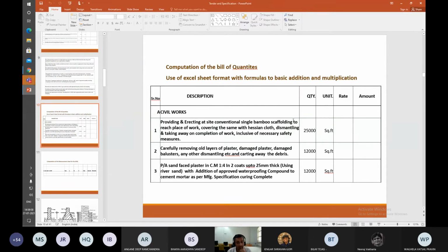So it will be excavating with the use of machinery 2 meters deep for footings, isolated foundations, with aspects to ensure non-collapse of mud, which is that word I'm missing out, and dewatering so that foundation processes can proceed. The other one is with the same kind of description, but with the depth of 3.5 meters.